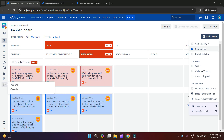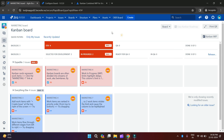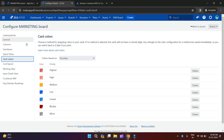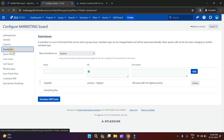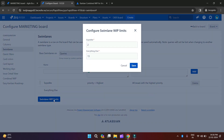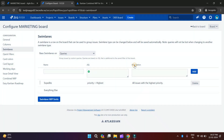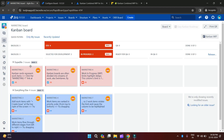Now in the swimlanes you can see max 2 and max 13 — where do these come from? You go to the board, click Configure, then in the board configuration click on Swimlanes and find the Swimlane WIP Limits option. When you click on Swimlane WIP Limits, you can set them here. Right now for Expedite I have 2 and for Everything Else I have 13. If you want to increase or decrease them, you can do so and click Save. Coming back to the board, you can now see the swimlane WIP max 3 and max 11.